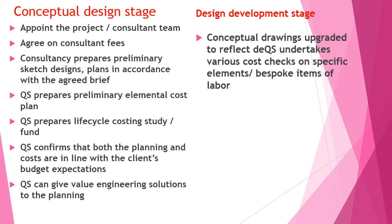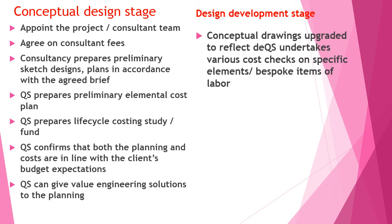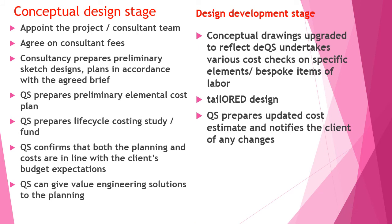In the design development stage, conceptual drawings are upgraded to reflect QS input. The QS undertakes various cost checks on specific elements and items of labour. The tailored design is prepared with an updated project cost estimate, and the client is notified of any changes.